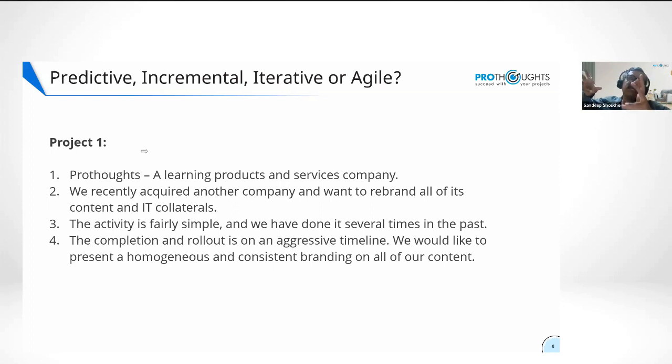First, let me rebrand this website, then I'll rebrand this course and this other content, and then their YouTube channel. No, I want consistent branding across, so I would roll out everything at once. So low frequency of delivery and low degree of change. To me, if I know what to do and how to do it, this is probably better done in a predictive fashion. If there is no need to experiment and no need to deliver incrementally, why bother? Just because agile is there, don't apply it like peanut butter everywhere. You have to be judicious. At least that's my opinion.